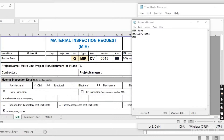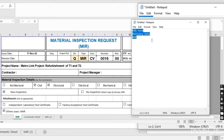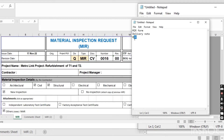So here you can see this is the MIR page. First I will tell you which type of documents you have to attach for the material inspection request. The first is the MIR form. After the MIR form, you have to attach the delivery note of the material — the material which you purchased from the market.